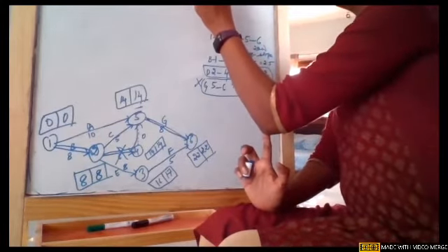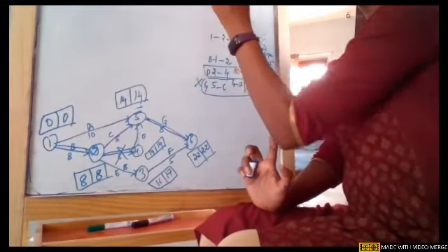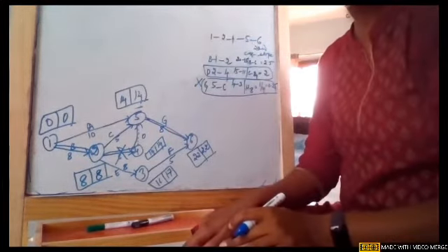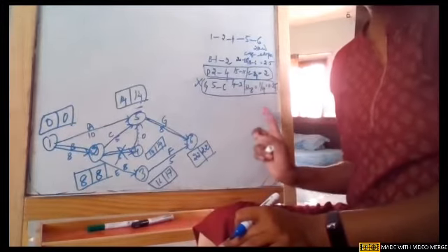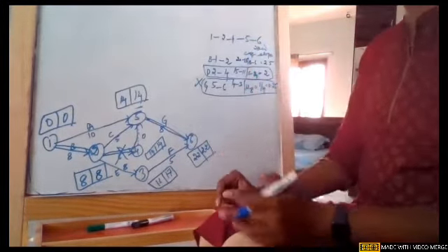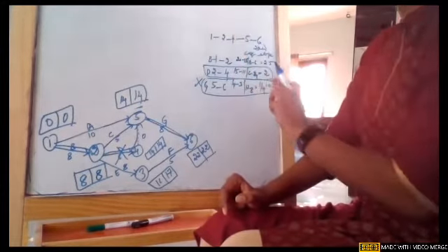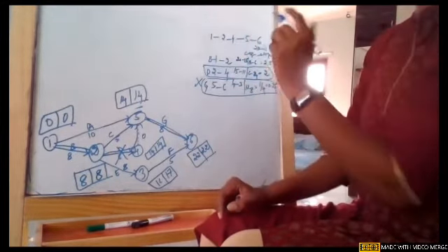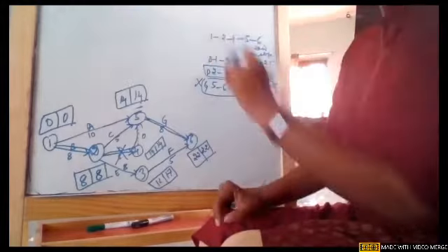4 into 0.25 into 1000, girls. Why did I just keep 1000? Because the cost is in thousands of rupees. I just took 0.25, which is the given value, without the 1000. So I just took 4 into 0.25 into 1000. Now just check 22 into 7.